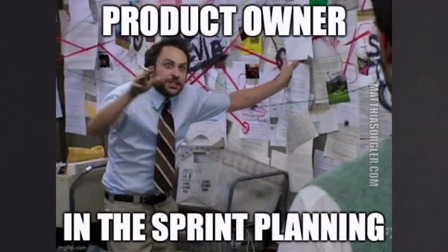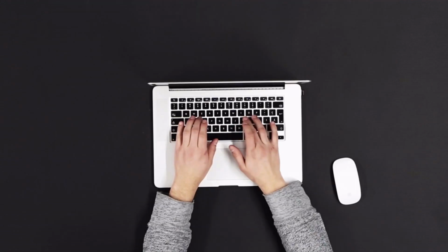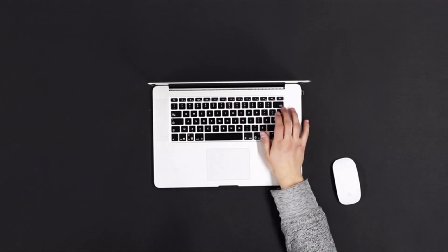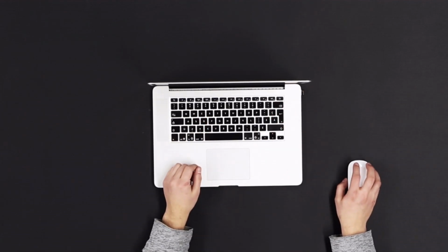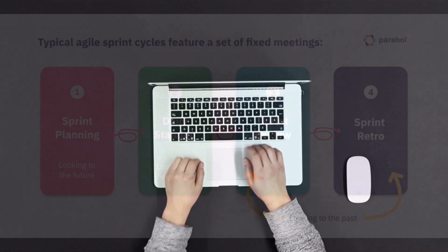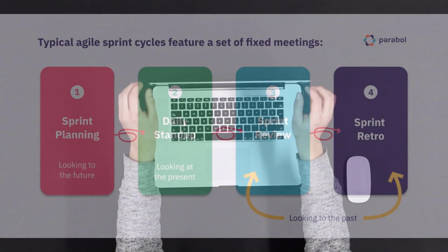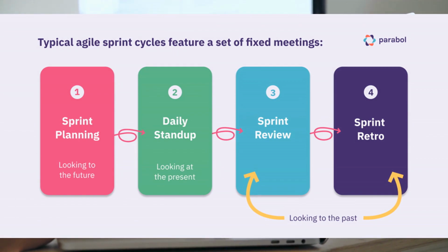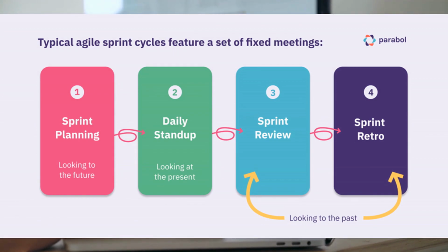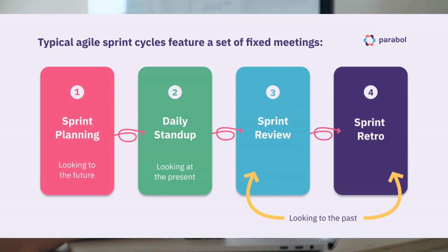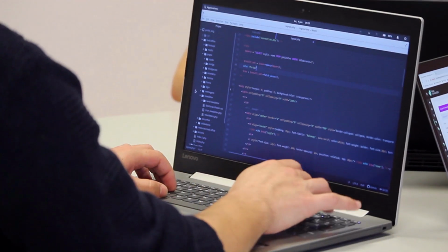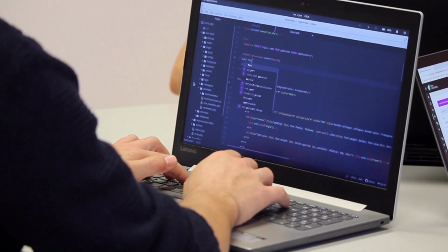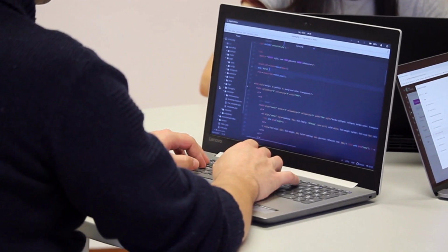So, the shorter the sprint, the easier it is to make changes to an existing project, because it is planned in the sprint. Accordingly, if the sprints are short, then you can quickly apply the changes in the next sprint. If the sprints are long, then you will need to wait for new changes if the customer knocked something in. It will be necessary to wait for the end of the sprint so that these changes can be implemented in the next one. This is partly the essence of flexibility. This is the Scrum approach.